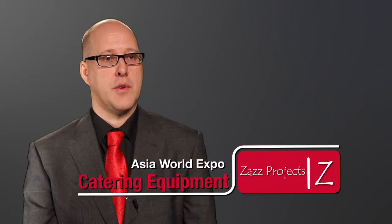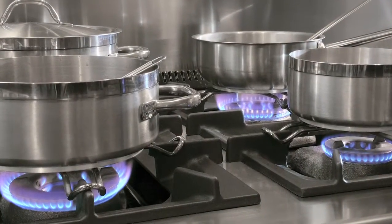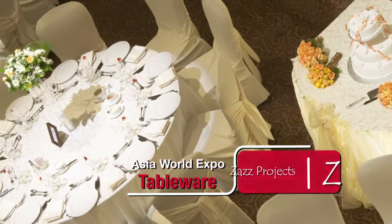The first batch of tenders, which totalled 8, was for the equipment for the various catering units, and that might include everything from a walk-in freezer through to a pig roasting unit, through to a chiller, to an oven. The start of that involved 8 companies, and we finally reduced that down to 2 companies who were awarded the contract.